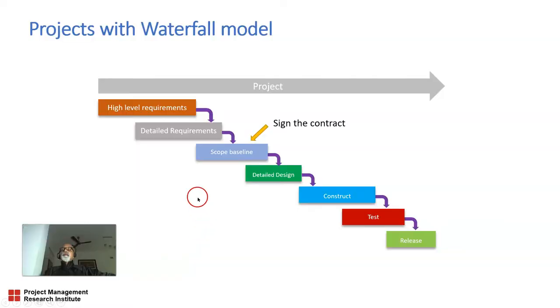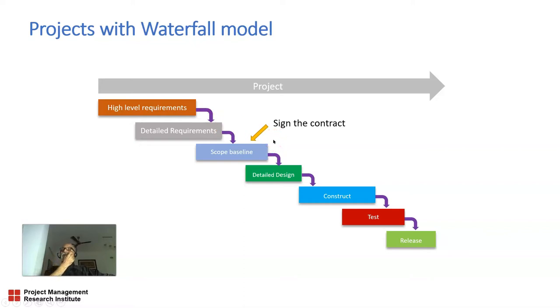Now I'll take you through these things in detail. In a waterfall model, first we define the high level requirements, then the detail requirements, then the scope is baselined, then we get into detailed design, then construction, then testing, and the release of the product. This looks like a waterfall — highly compartmentalized. After every phase there is a sign-off and a formal handover and takeover, and the project progresses in a series of stages like a waterfall.